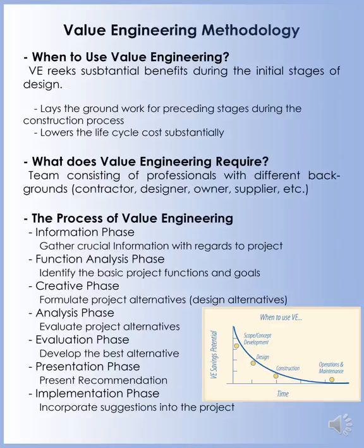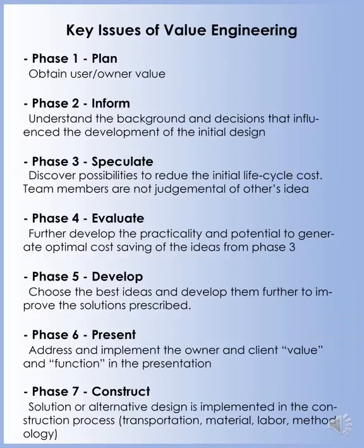Value engineering reaps the most benefits when applied in the initial stages of design, as it lowers the life cycle cost the most in the initial stage. A team of professionals are grouped together to go through 7 progressive phases in this method. The key issues tackled in each of the phases are as follows. In the planning phase, the team obtains the user or owner values.